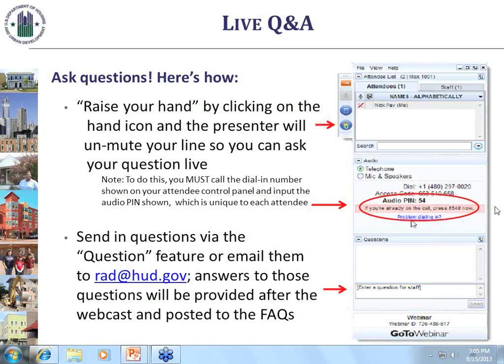We have a question on replacement housing factor funds. If a PHA anticipates receiving future allocations of RHF funds, can I include the RHF fund commitment in my RAD deal, even though I've not received an ACC agreement for the 2014 RHF funds? Right. So if you've received it for 2012 or 13 or 11, great. It means it's on our books, and we can easily incorporate it. If you're about to get it in 2014, we'll also do a back office thing to make sure that yes, you can include that in the deal, and we will work with you, even though it didn't show up in our 2012 database. So yes.